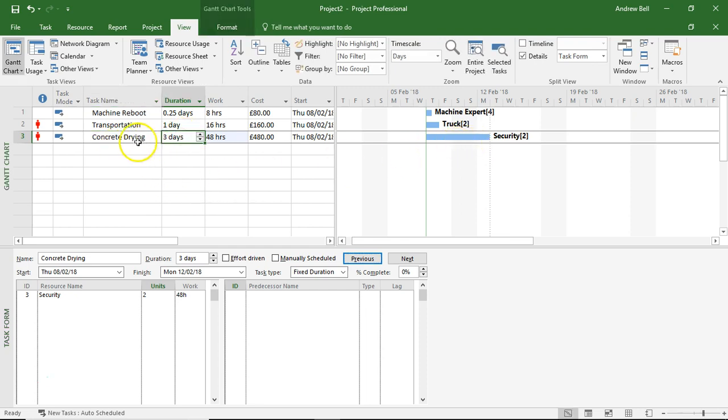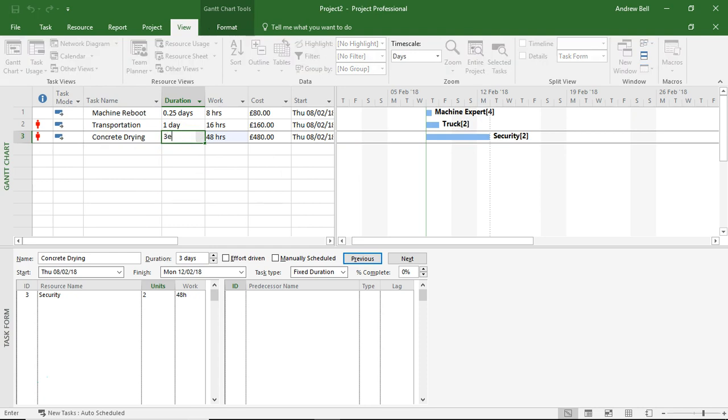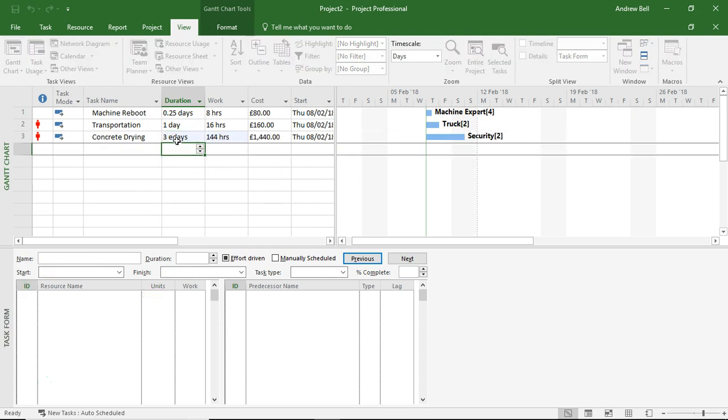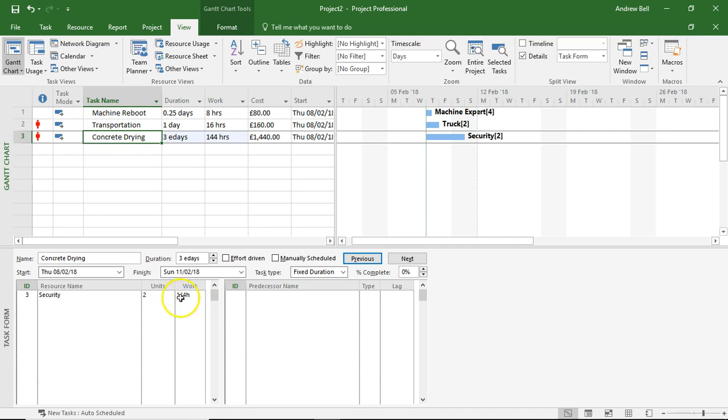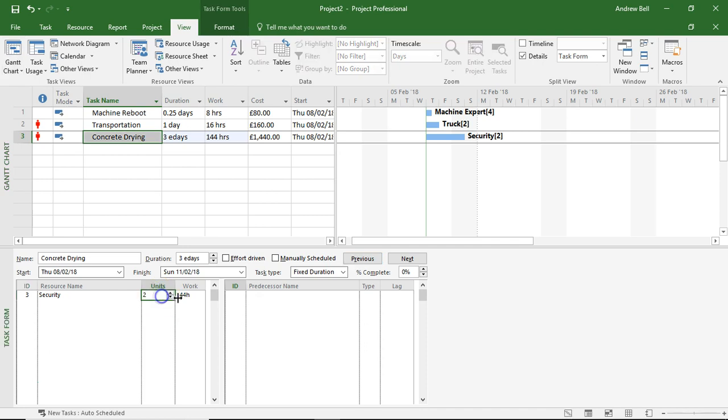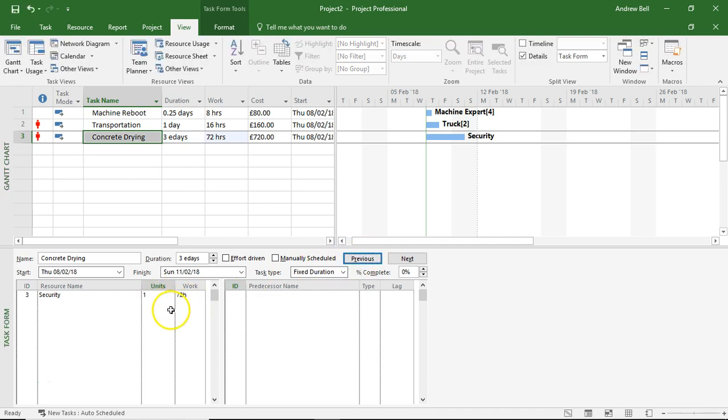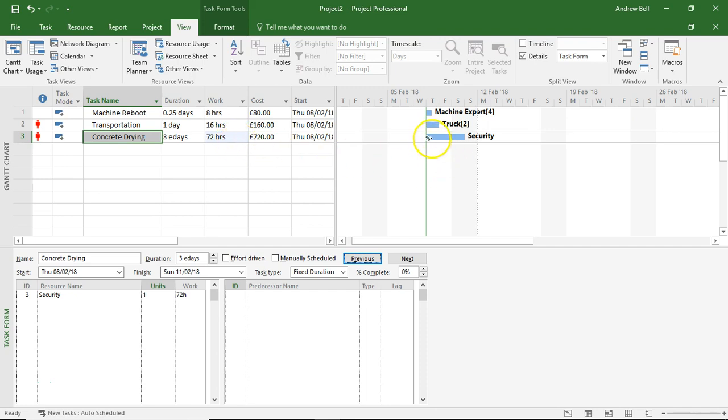What I should have done here instead of saying three days, I should have said three elapsed days, because elapsed days will tell the task to ignore the calendar time. And this has also, because three elapsed days, it's also set the correct amount of work and the correct amount of costs for my security staff. Let's just make this easier by making it one person on the task. Three elapsed days, three lots of 24 hours is 72 hours. Three elapsed days means Thursday, Friday, and Saturday, and then on Sunday the task is finished.